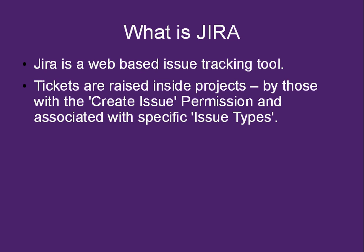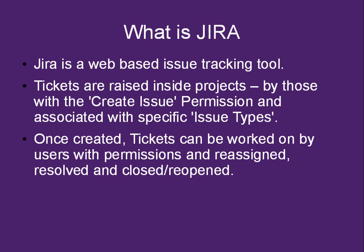Tickets are raised inside projects by those with the create issue permission, and then they're associated with a specific issue type such as bug, issue, enhancement, or query. Once a ticket has been created, they can be worked on by users with permissions and reassigned, resolved, and closed — or reopened or any other transition that you've defined in the workflow.